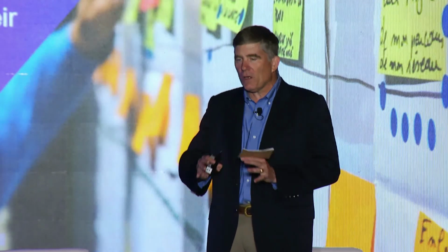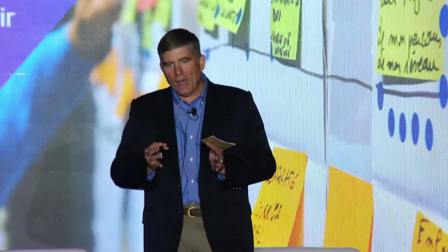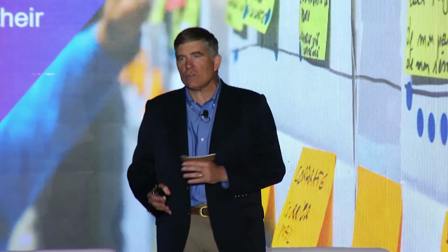And I was thinking about the Leaning Tower of Pisa that he had on there a little bit ago. As you think through that, you're thinking about, well, am I going to do that as one project and have just an EPC do that? Or am I going to go maybe do the engineering first to really understand the engineering and the implications when I go to realign that structure, and then maybe go out and bid the construction separately? And maybe the procurement, because it's micropiles and reinforcements and things like that, maybe the procurement's better off being with the construction contractor, maybe it's better off being with the engineering contractor, and that's what this project delivery system discussion is trying to talk about.